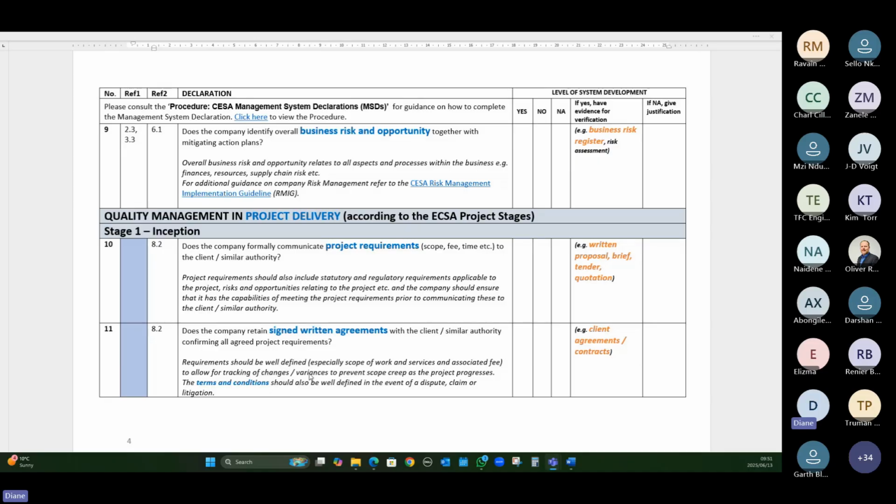And I think a lot of the time, if we're just sending out emails or a letter or a proposal, very often we forget to refer to a set of terms and conditions. So that's why I always say, try and get an industry standard agreement behind you, get your client to sign it or have evidence of that, because when things go wrong, that's going to be the document that we need to go back onto. And a lot of the PI insurers say this is where the problems arise. If you get a claim in and they start investigating and there's no written agreement, it just makes that fight so much more difficult. So rather be proactive, have an agreement, have it signed off, have it in place right up front.